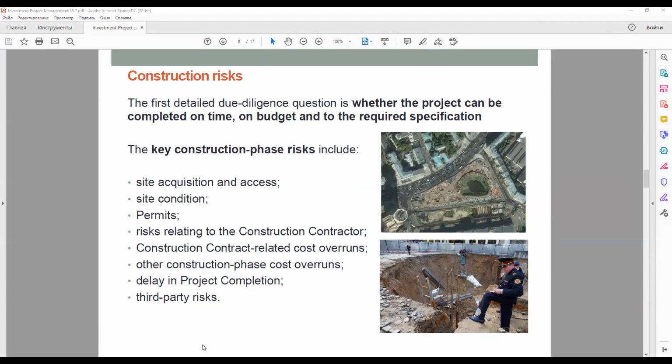Geological structure. Generally speaking, the construction contractor should accept the risk of problems with the geology, for example, affecting foundation or piling costs. Test borings before the construction contract is signed, perhaps carried out by the project company or contracting authority, can be helpful in this respect, although this can never provide 100% certainty that there is no problem that has not been picked up by the survey.